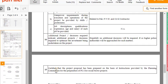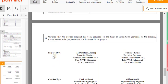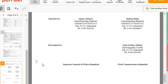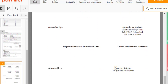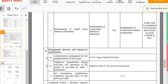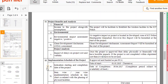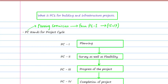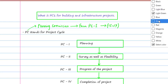These are the important components of the PC1 form. You may get multiple choice questions such as: who prepares the PC1 — the Executive Engineer; who checks it — the Superintendent Engineer; who forwards it — the Chief Engineer; and who approves it — the Government of Pakistan, the concerned ministry, such as the Secretary Interior. You need to remember these 15 steps in the PC1 form.